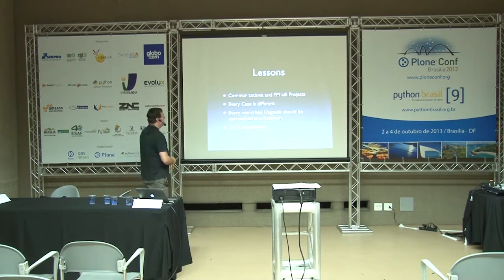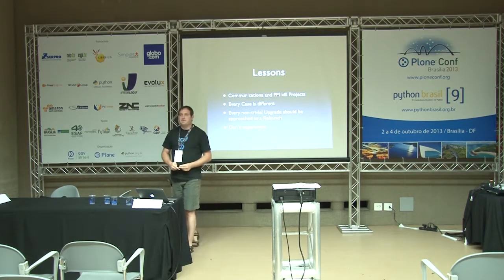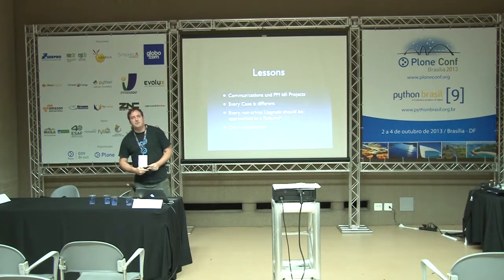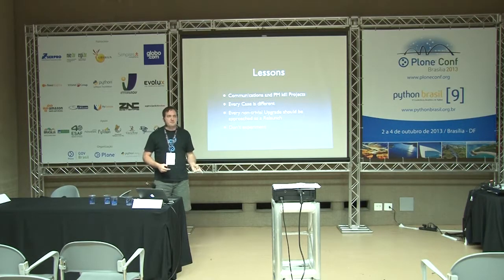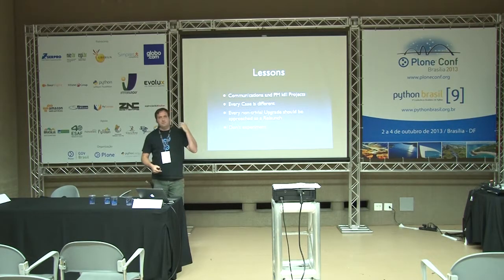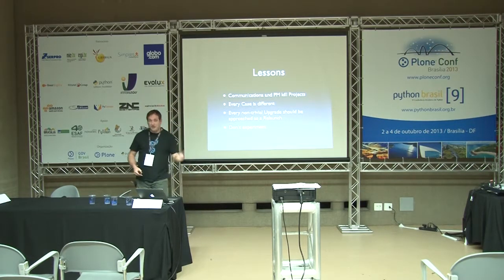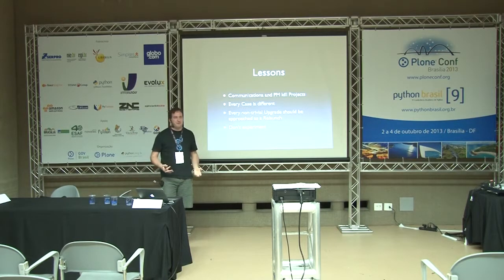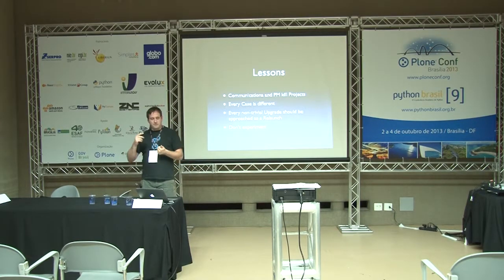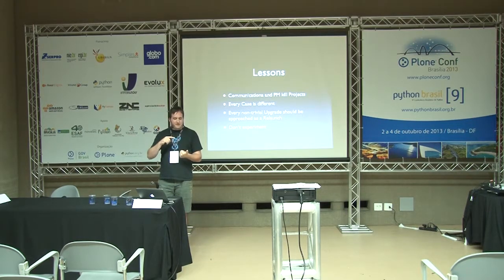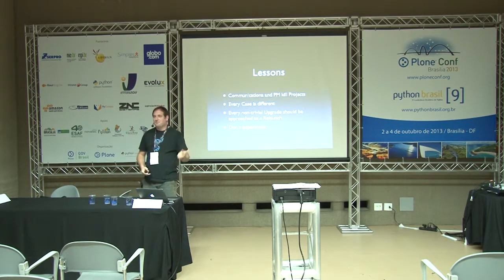And the last lesson I learned is don't experiment. Keep the technologies that are new to you to two, or maybe only one. So if you're new to Diazo and new to Dexterity, don't try both at the same time. Only do one, maybe do none, depending on the customer and how safe you feel. We tried to move a project to Dexterity, including migrations, to Diazo, including the toolbar and Plone app widgets, and well, we had to throw out two of these. That was kind of expected.